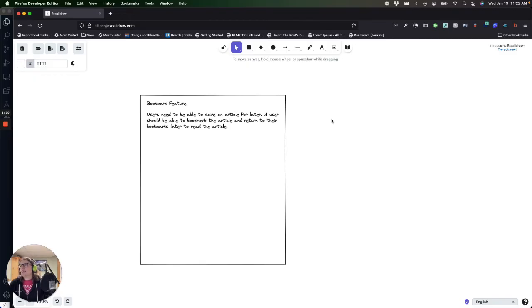So now we're going to begin to break this down into a set of should statements. Similar to how we say a user should be able to bookmark the article, we really want to get more fine-grained. So here I am, the design comes to me. There's not really a functional spec. That's what we're creating. As a developer, if you receive a design without a functional spec, you should go ahead and create one for yourself.